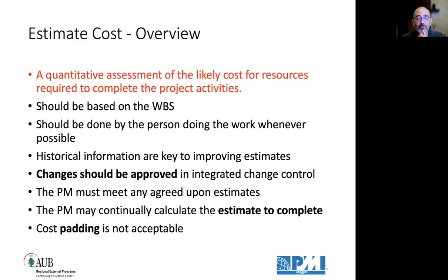Any changes should be approved in integrated change control because, as we said, the three baselines, the scope baseline, schedule baseline, and cost baseline, are formally changed through perform integrated change control. The project manager must always meet any agreed upon estimate, within the margins of the contingency reserve and the management reserve.